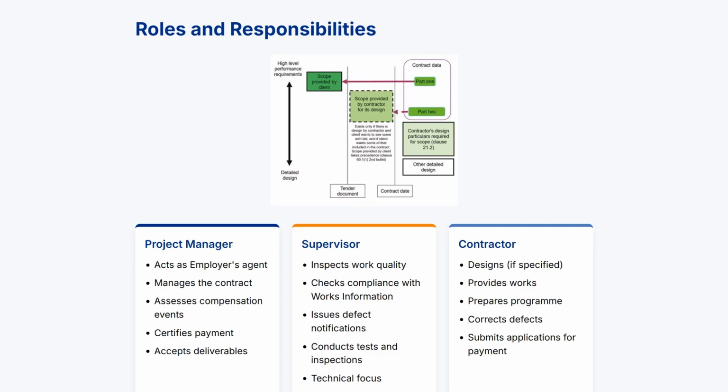The NEC4 ECC clearly defines three key roles with distinct responsibilities. The project manager acts as the employer's agent and has extensive contractual authority. They manage the contract, assess compensation events, certify payments, and accept deliverables. Their decisions directly impact time, cost, and quality outcomes.